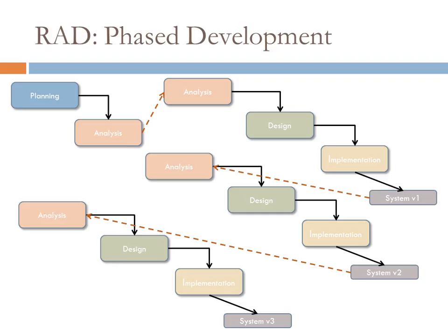And you sort of see this then going into the next phase where you're incrementally adding additional functionality to the system overall. So it's another way of approaching this that is a little bit more organic than the structured design, in the sense that, one, you focus on the most important needs first, and then you build in additional functionality. It also means that a system gets put in place and into use a lot more quickly.